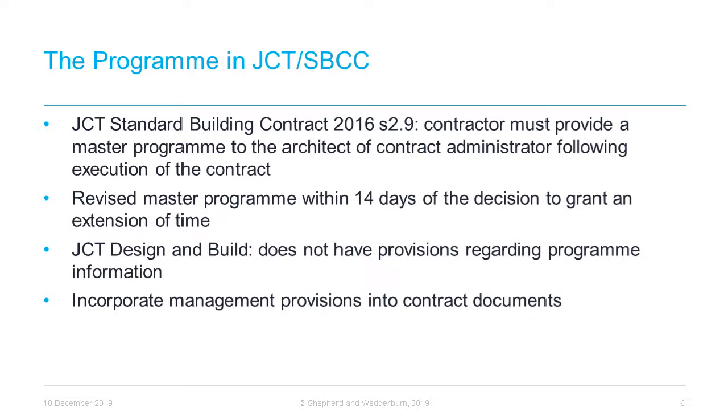In contrast to the standard building contract, the design and build contract does not deal with the provision of programme information. This approach is largely consistent with the nature of works carried out using design and build contracts, as flexibility in programming is often required. However, the employer may still require access to programme information in order to assess extension of time claims.